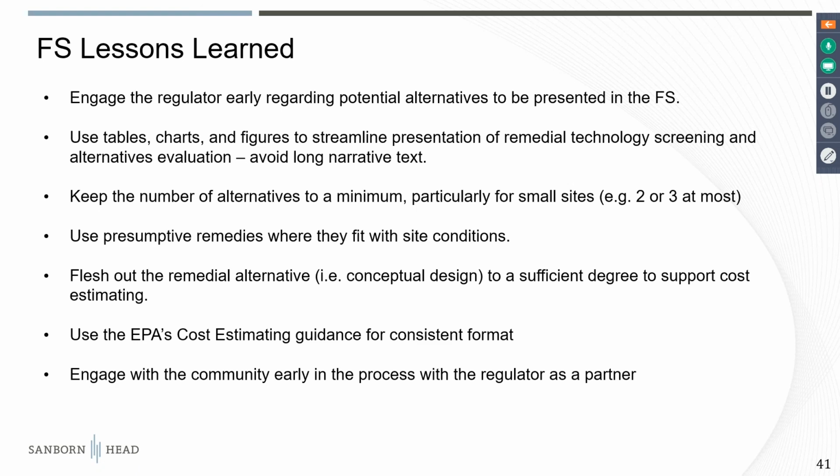Good point. So I guess to remember, the higher the interest rate you're assuming, then that's less emphasis on what the actual O&M might be. So it's really beneficial as regulators out there to make sure the interest rate that people are using is lower and more realistic, not 7%.